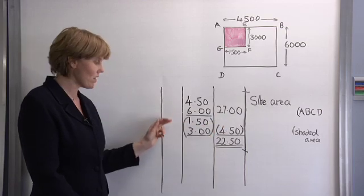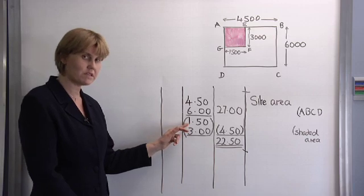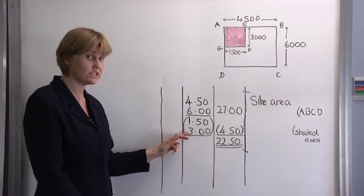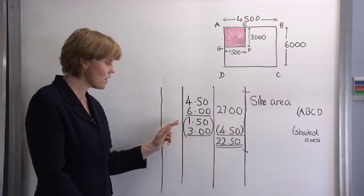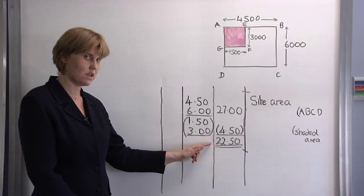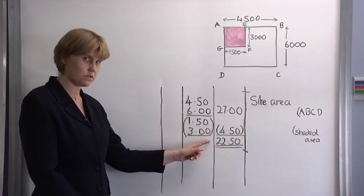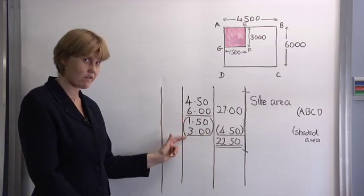Now let's look at our area we wish to deduct. That area is 1.5 metres in length by 3 metres giving us a total deduct area of 4.5 metres. Now note how we present this. We do this by the use of brackets. So these brackets denote that we have a deduct area.